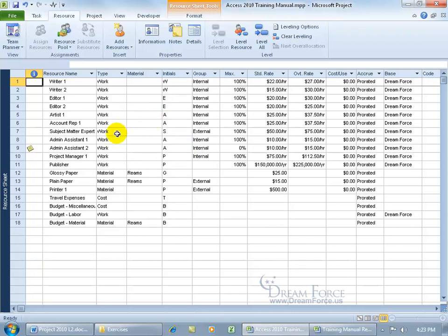Actually, it's linked. So if I go ahead, and I'll show you this later on, if I assign a resource in another project that's sharing this as well at the same time without any overtime for a standard day of 8 hours, so they're working 16 hours, it'll show it in red here and also in their projects. But let's keep it simple for now, and you can see that we do have resources being pulled over, or we're linked to the pool.